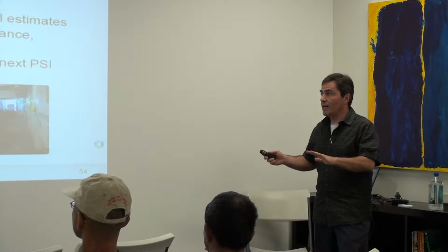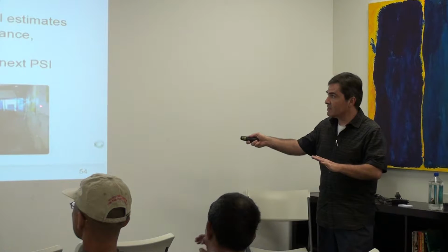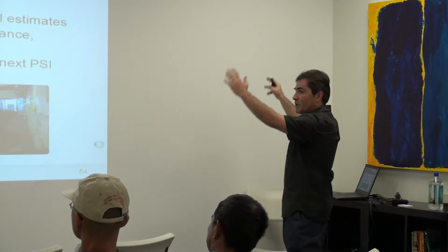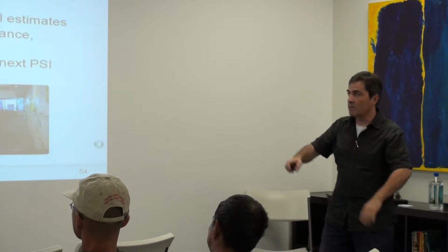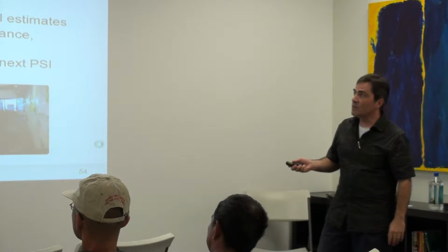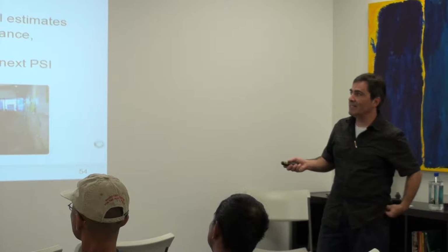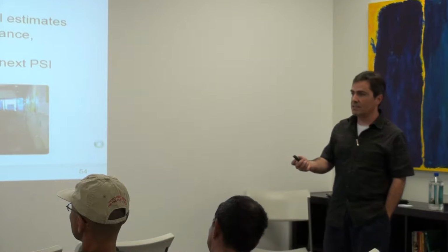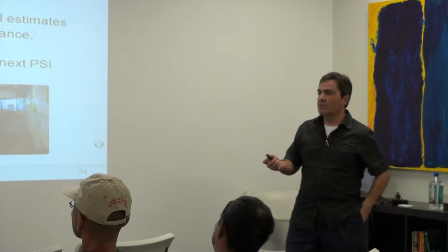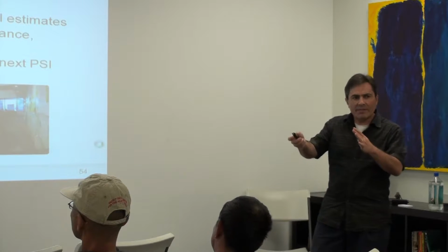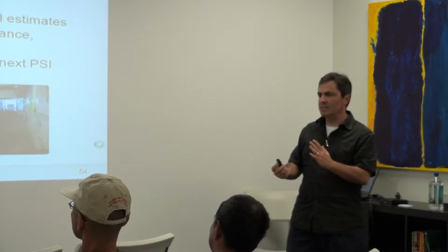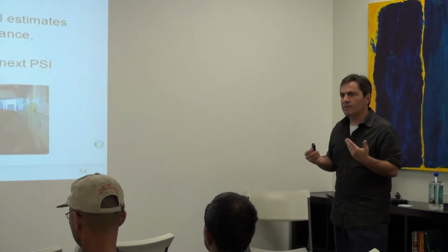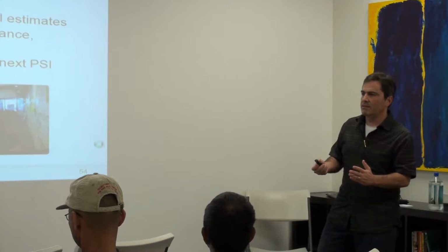And these things get kind of wild. I mean, if you look here, you've seen small post-its. There are these big post-its that get put up all around the place. So the result of this 2 days of meeting is a committed set of program objectives for the next PSI. You've heard of sprint planning. We're planning for the next 2 weeks. This is planning for the next 10 weeks. And we come out of this 2 days of planning with a locked and loaded plan for the next 10 weeks.